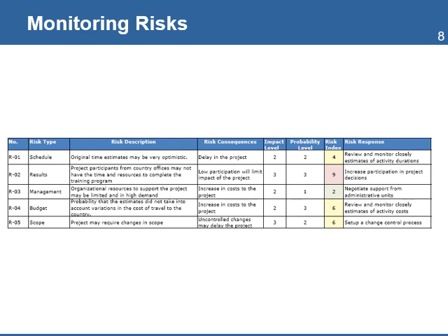On a regular basis, you should monitor the status of the risk register. This review is necessary to make changes to the initial analysis on the levels of impact and probability the team made on all risks at the start of the project. As the project makes progress, the team will have more information, or there may be changes in the environment, assumptions, and conditions that can result in changes to the risk, or even discover new risks that need to be included in the risk register. You need to add updates on the progress of the risk mitigation strategies you are implementing and communicate this information to all key stakeholders.